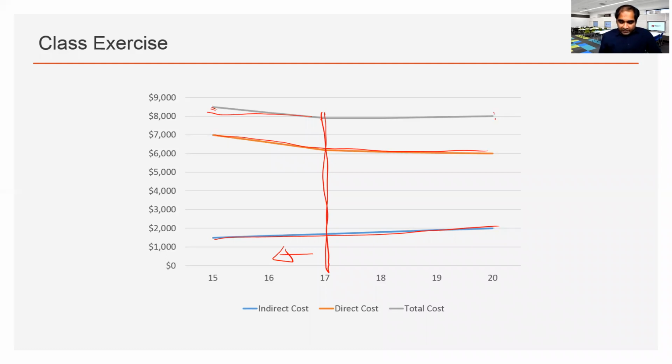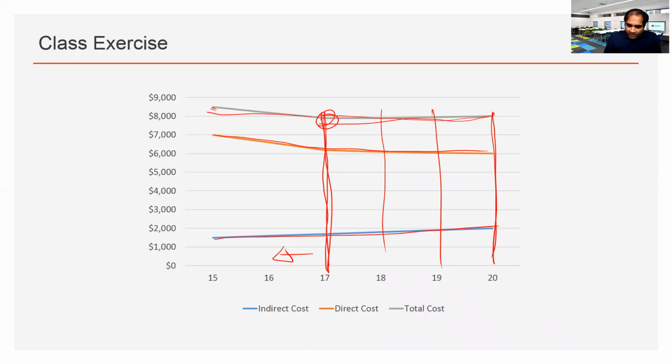So if you have this information, starting from the normal duration and each day, how much the total cost will change. From this specific example, you can see that we can reduce it by at least 3 days and still have the same total cost. It's a flat curve.